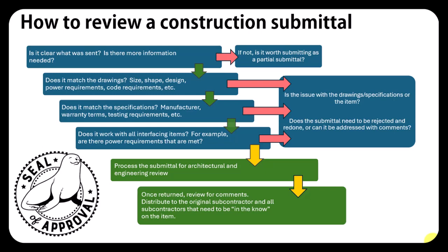So we're going to go back to our appliances. Appliances need to go to not only the appliance person who sent you that submittal, they need to go to the electrician to make sure they have the correct power requirements. They need to go to the cabinet manufacturer to make sure that the cabinets are going to have the correct opening. So think of not only the item, but what touches the item. Who needs to know about this item? And when in doubt, send it to everyone. Now, something to keep in mind with that is it is not a catch-all. You cannot just send every single submittal to every single subcontractor and expect them to do your coordination for you.